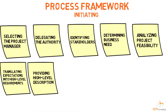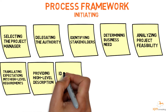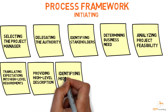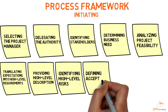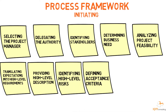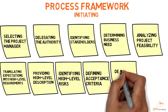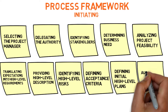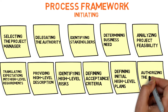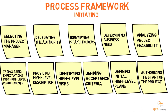Further key initiating activities include: providing a high-level description; understanding the overall project risks; defining success criteria; defining initial high-level plans such as a schedule, a budget, and an organization chart; and formally authorizing the start of the project or phase.